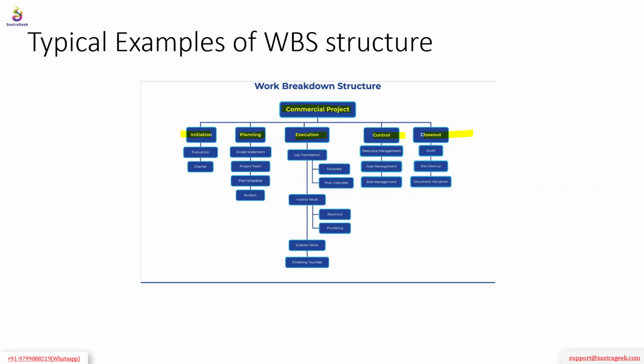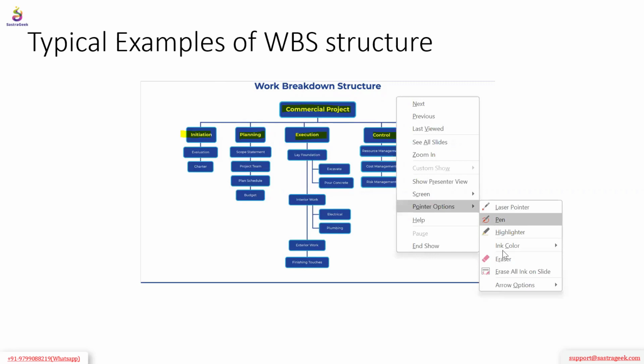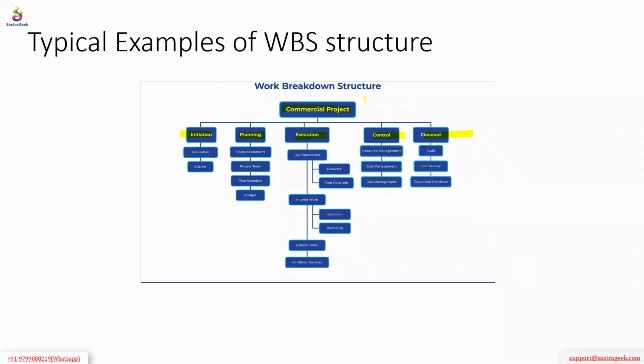The benefit of defining a project level WBS element is that project definition is not a WBS element. Project definition does not carry any cost or budget. If you don't define this level 1 WBS element, then whatever report you execute will have no reference. If you want to check the project level cost, you have to perform all of that manually, because if you define initiation, planning, and execution phases directly under project definition, it's a hierarchical mess.